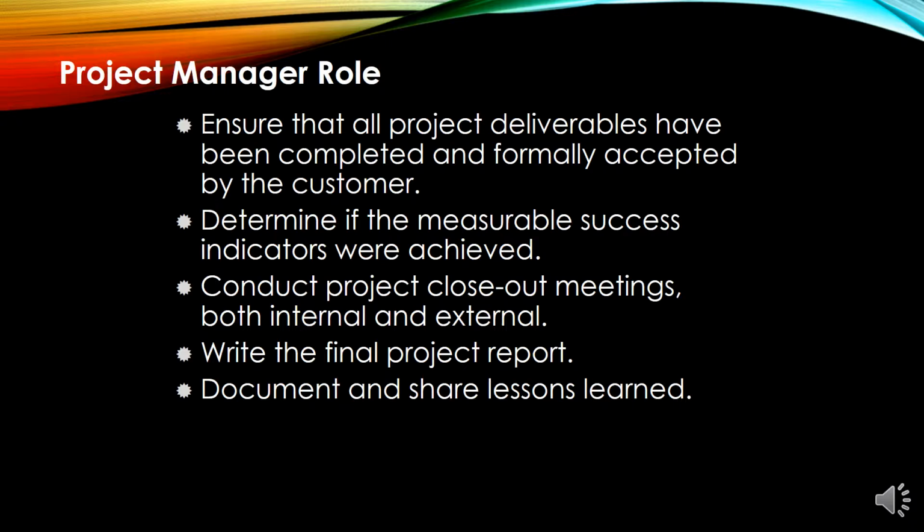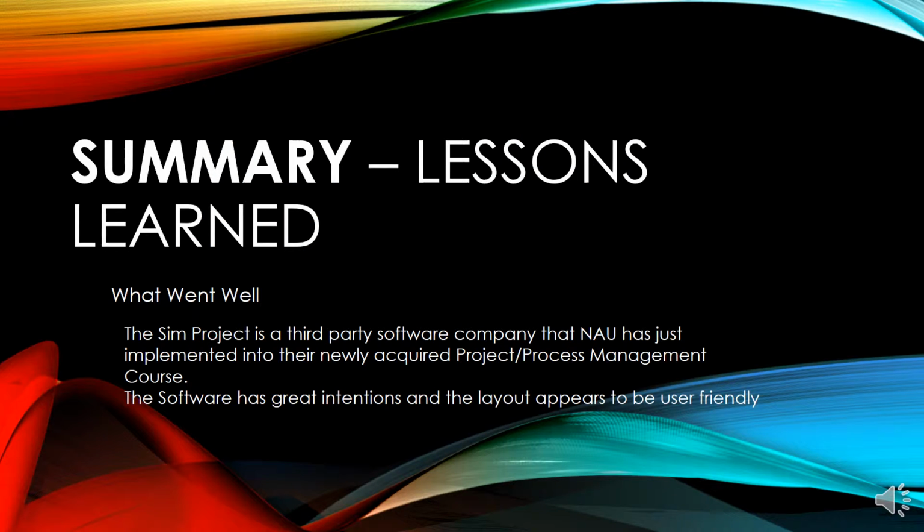The project manager will write the final project report, identifying what we use as the lessons learned: what went right, what went wrong, what can we do to make things better, and so on and so forth. And when that's all compiled, it'll be documented and it'll also be shared in the lessons learned segment. So, a summary of the lessons learned, we're going to talk about the things that went well, the things that went not so well, and the things that we could do in the future to make things better.